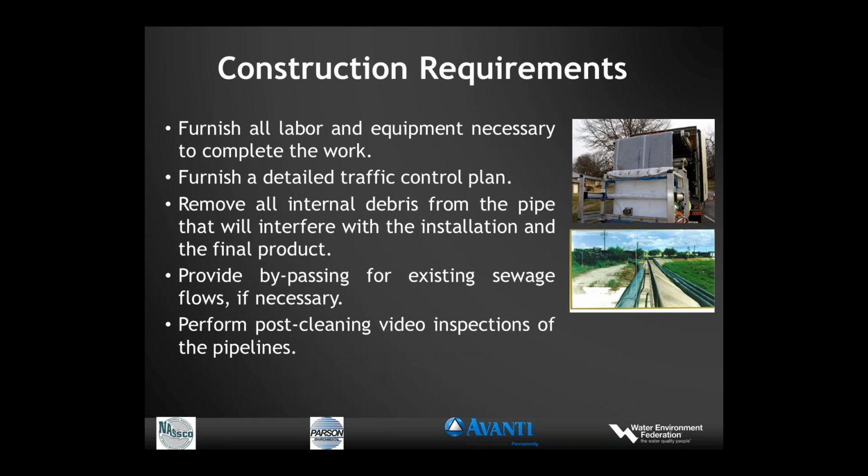Construction requirements. First off, the contractor should furnish all labor and equipment necessary to complete the work. It sounds simple enough, but there have been jobs where arguments occur over who should supply a certain piece of equipment. So that should be taken care of in the specifications.